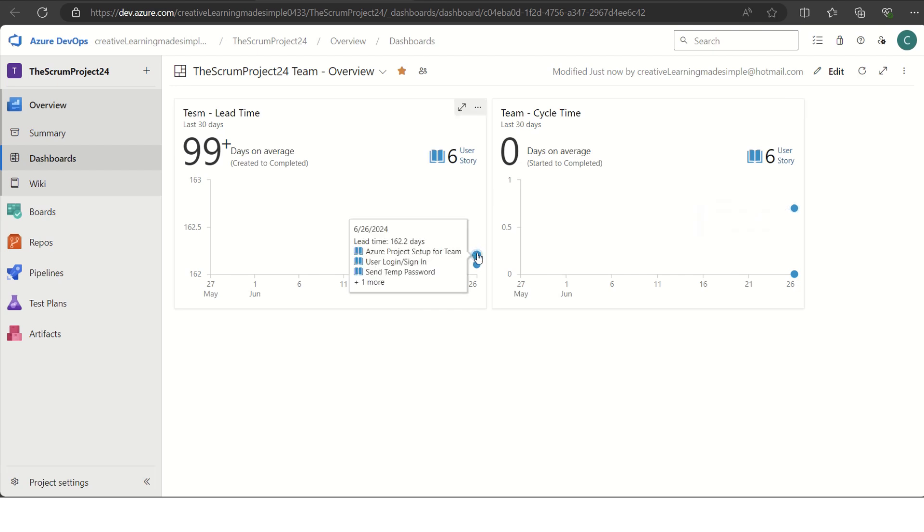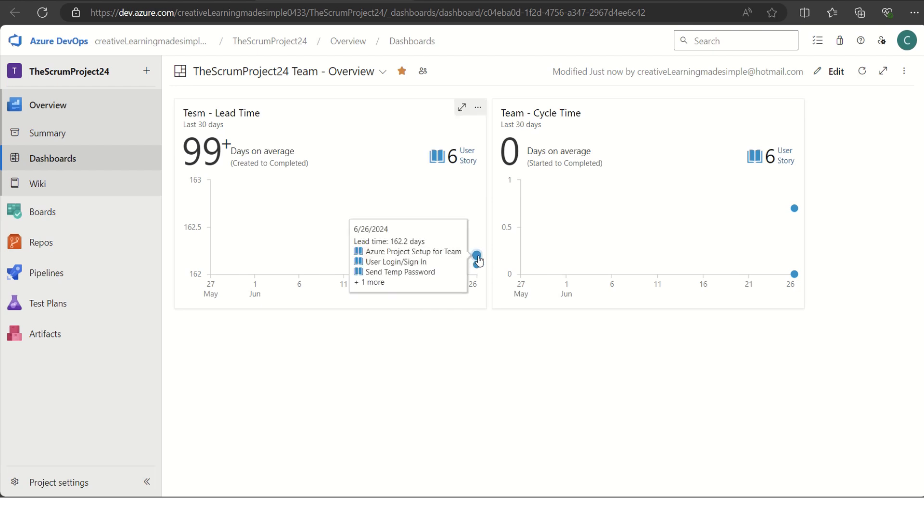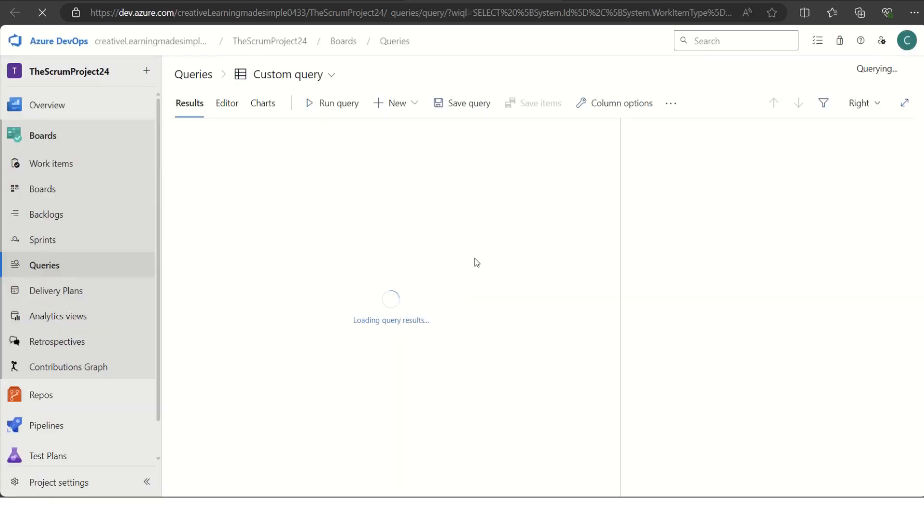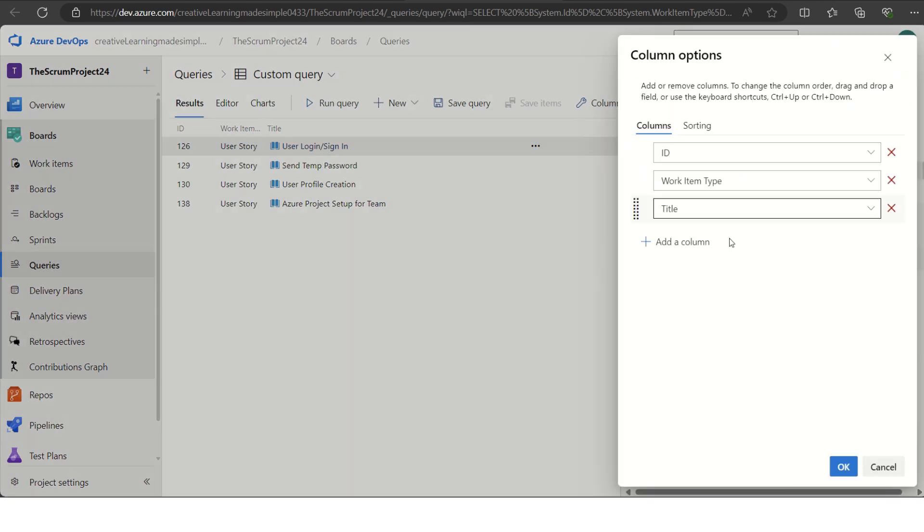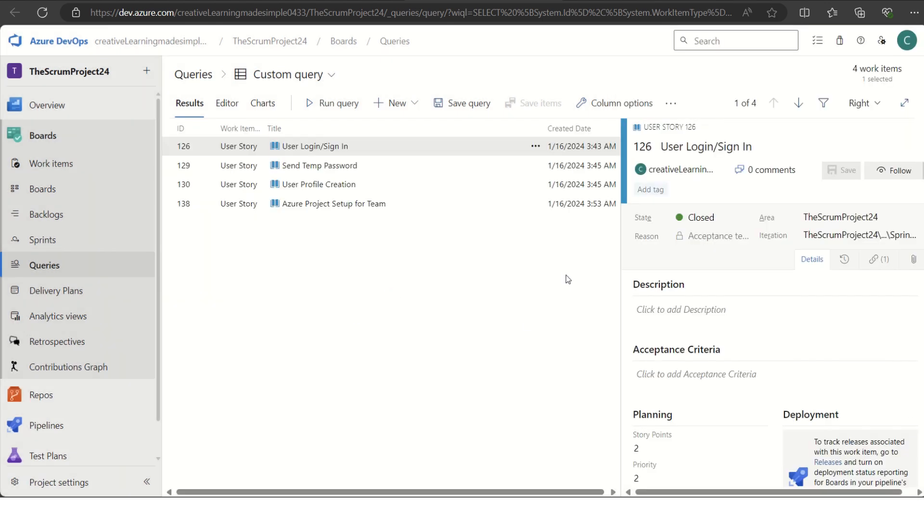Why is it showing that much time for the lead time? Because as I have mentioned, we created these stories long time back and we can always check this. If I click on this number, it opens in a new tab and we can see these are some of the stories based on our click. Now if I go to the column options and try to add a column when they were created. I have selected the created date. If I click on OK, you guys can see clearly that these user stories were created on 16th of January this year. That's why it is showing that much of a lead time.